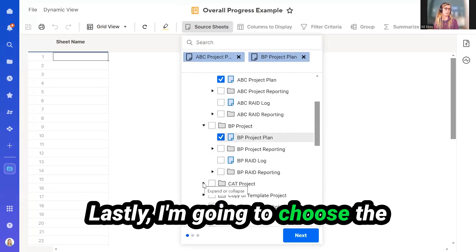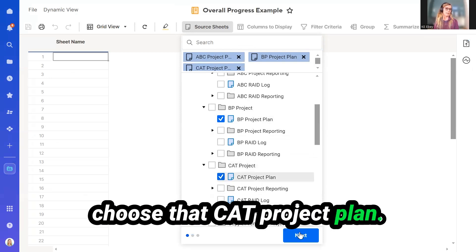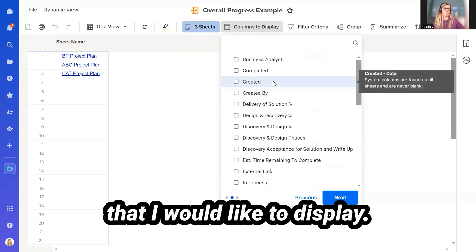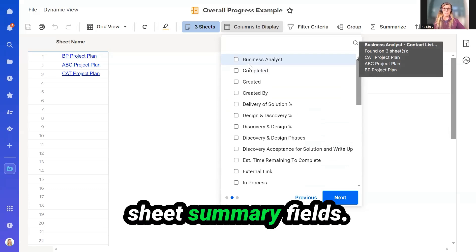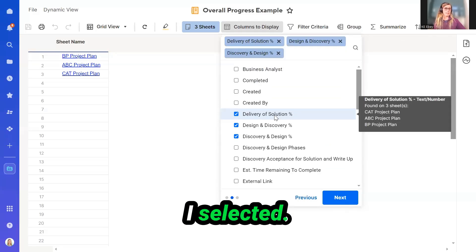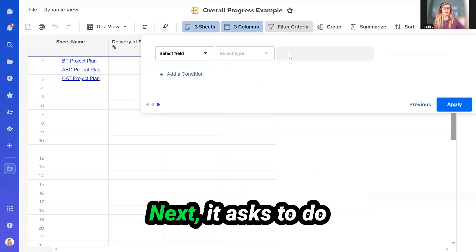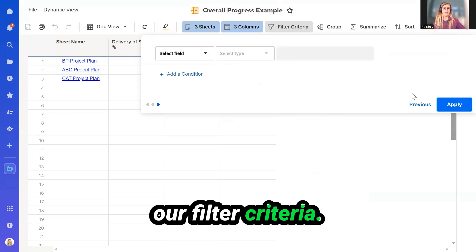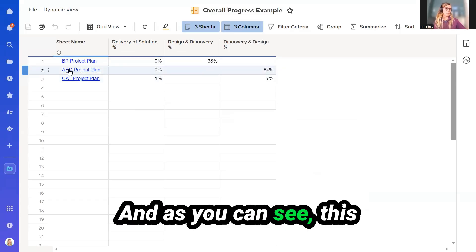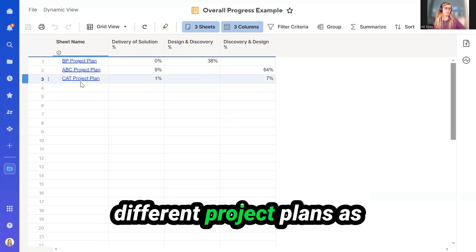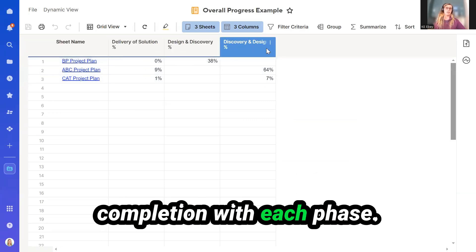Lastly, I'm going to choose the CAP Projects and select that CAP Project Plan. Now I go through the options of the columns I would like to display. All of the columns it's providing are actually Sheet Summary fields. For each project I selected, I would like to know the percentage of completion on each of these phases. It asks to set filter criteria — I'm going to skip this for now. And as you can see, this report is providing the three different project plans as well as the percentage of completion for each phase.